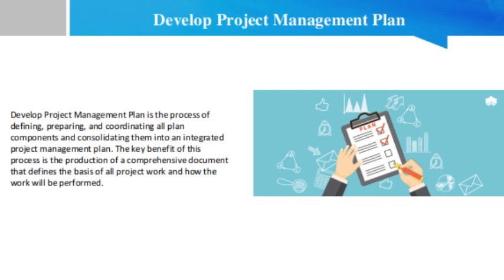Friend, today's topic is develop project management plan. Develop project management plan is the process of defining, preparing and coordinating all plan components and consolidating them into an integrated project management plan. The key benefit of this process is the production of a comprehensive document that defines the basis of all project work and how the work will be performed. This process is performed once or at predefined points of the project.